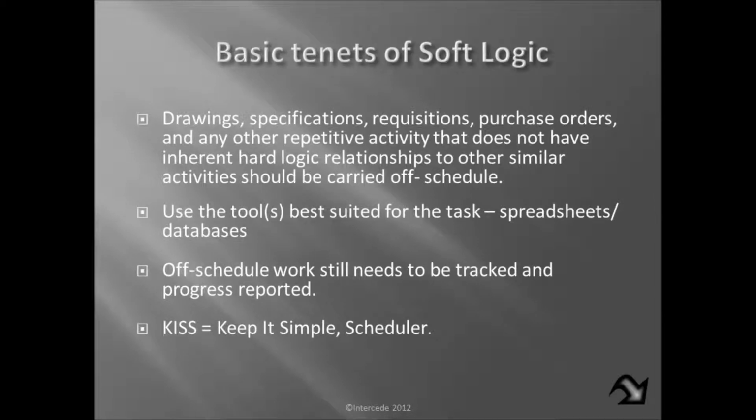Now, why we do this, of course, is just because of the complexity involved. We want to take any of those repetitive activities, drawing production, issuing the PO, or installing bulk systems, pipe, whatever. We want to take them off schedule and watch them in a venue more appropriate. And for the most part, that will be spreadsheets.